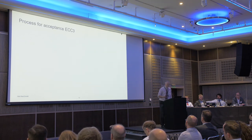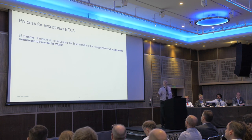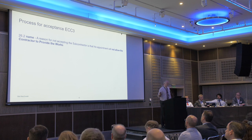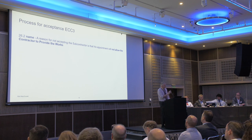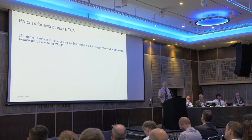The process for acceptance — you all know this. We've got to ask nicely: 'Can I use that particular subcontractor?' The project manager's only stated reason for not accepting must be in the contract; otherwise it's a compensation event. The only reason is that they will not allow the contractor to provide the works.